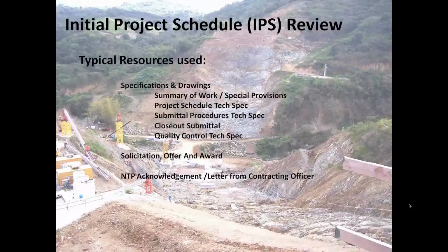Get familiar with the work. If site access is limited or project site is crowded, you want to make sure activity sequencing accounts for this. For example, if your project involves the erection of steel for multiple buildings on a congested site, you would review the logic sequence for the steel erection. If the work involves complex mechanical systems with specific commissioning procedures, you would want to make sure these are accounted for also.